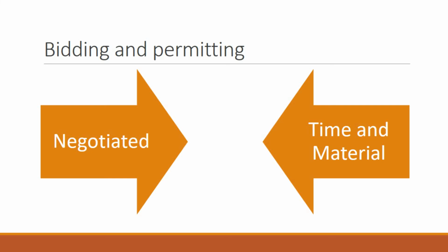Now, the second strategy is the time and material strategy, and with this method, work is completed in accordance with previously agreed upon labor rates and material markups. While this makes it possible for work to start right away, the job must be continuously monitored and might be challenging overall. Purchase orders are issued to chosen suppliers, contractors and subcontractors when the bidding process is complete. Contracts are typically advised for complicated projects, pieces of equipment or systems, as well as when costs reach a certain level. It usually isn't worthwhile to require a formal contract for smaller purchases.